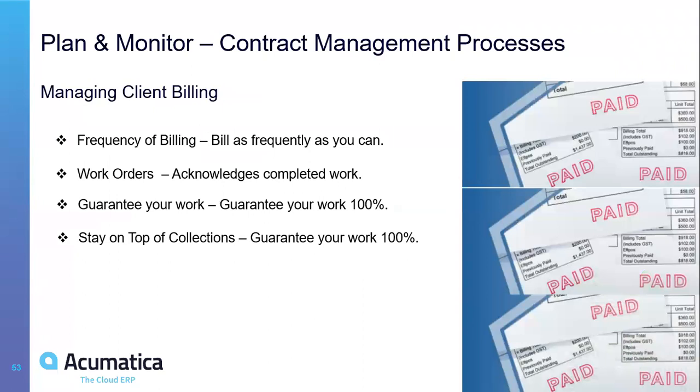And very important, billing. In most organizations, you as a project manager are responsible for invoicing. In the statement of work, here in Asia, most of the time we have milestone billing. So when the customer signs a design document, we can issue an invoice. It's your job to speak with your finance team to say we can issue this invoice now.